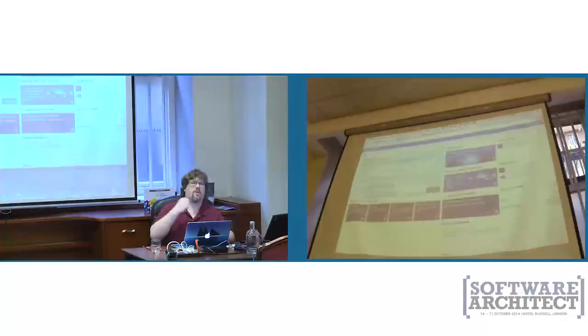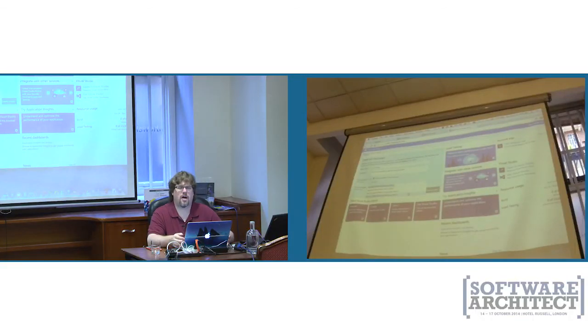The workflows, though, are different between the templates. As I mentioned, the CMMI template is much more formal. For example, when you open a bug in the CMMI template, it's not really a bug, it's not active. It needs to be reviewed, it needs to be triaged before it's actually a bug. You create a bug in the Agile, the Scrum template, it's a bug, right? It's live and ready, and it's just a matter of when you're going to work on it. So there's a different mindset.